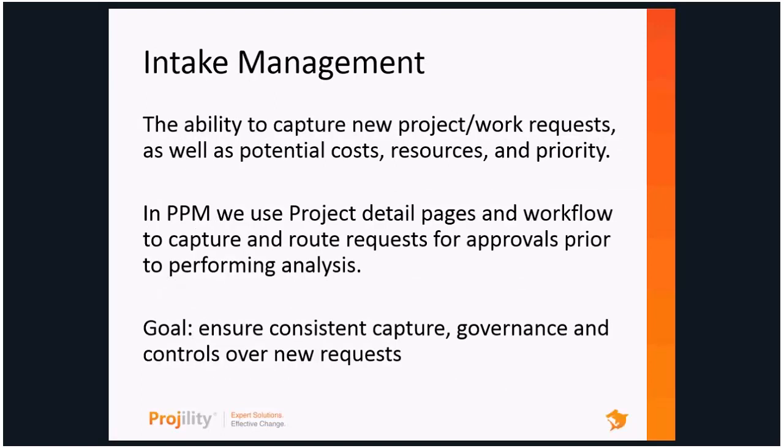Intake management on its own is a big part of a process we spend a lot of time working on. It's really the ability to capture new project and work requests, as well as cost, resource, and prioritization information. In PPM, we use a set of functionality called project detail pages, and we also use workflow to not only capture the information, but also route it for different levels of approval so we can perform our analysis. The real goal with intake is to ensure we have a very consistent, measured process for capturing, governing, and controlling all of our new requests.